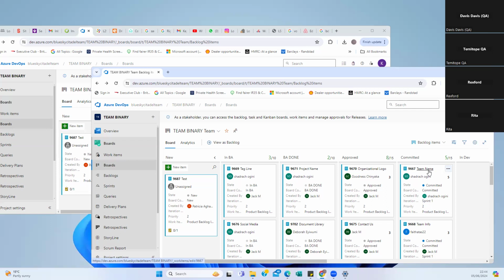You kind of go with the flow, because it's just a different approach, whereby you wait for a requirement to be done before you go to the next phase. You wait for that phase to be completed, reviewed, and approved before you then go to the next phase. That's why it is called waterfall, because it's sequential. In Agile, we don't practice that. In Agile, you work with sprints. You bring out the PBIs in chunks, bit by bit.